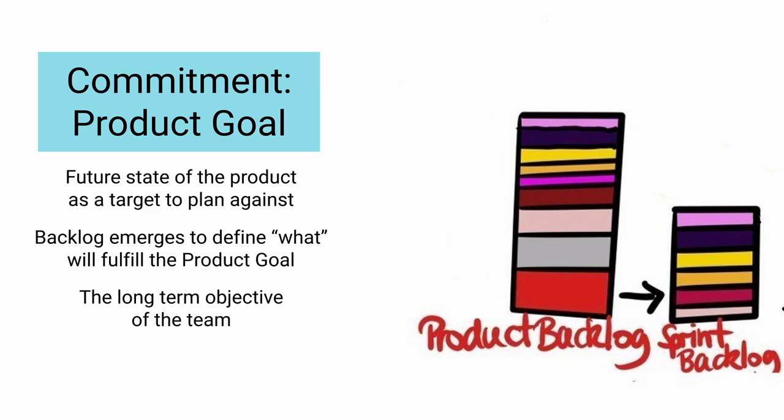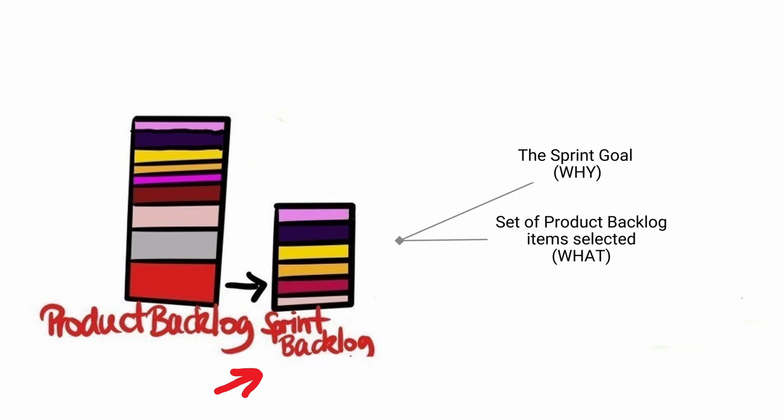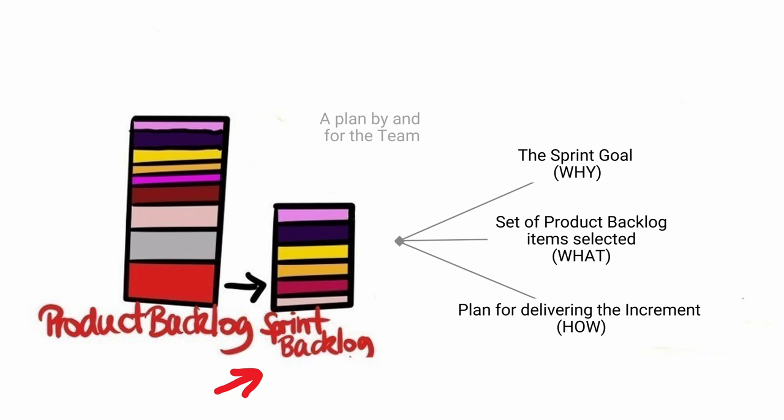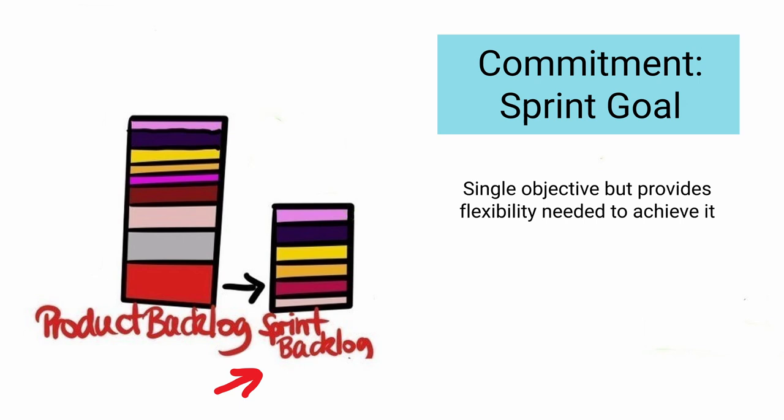Sprint backlog. The sprint backlog is composed of the sprint goal (why), the set of product backlog items selected for the sprint (what), as well as an actionable plan for delivering the increment (how). The sprint backlog is a plan by and for the team. Commitment: Sprint goal. The sprint goal is a single objective for the sprint but provides flexibility in terms of the exact work needed to achieve it. The sprint goal also creates coherence and focus, encouraging the Scrum team to work together rather than in separate initiatives.